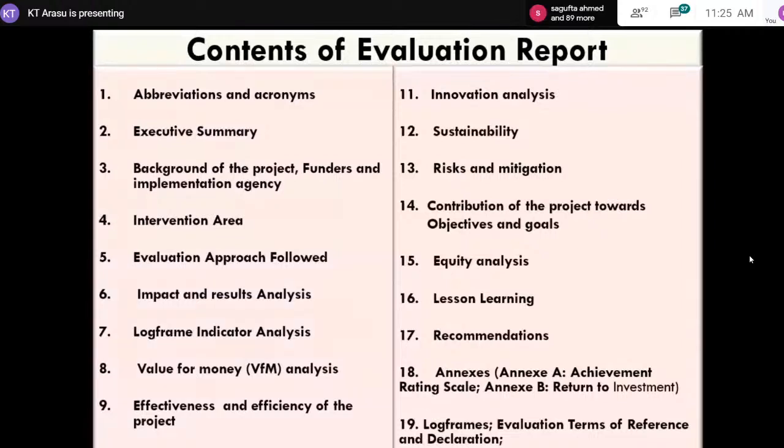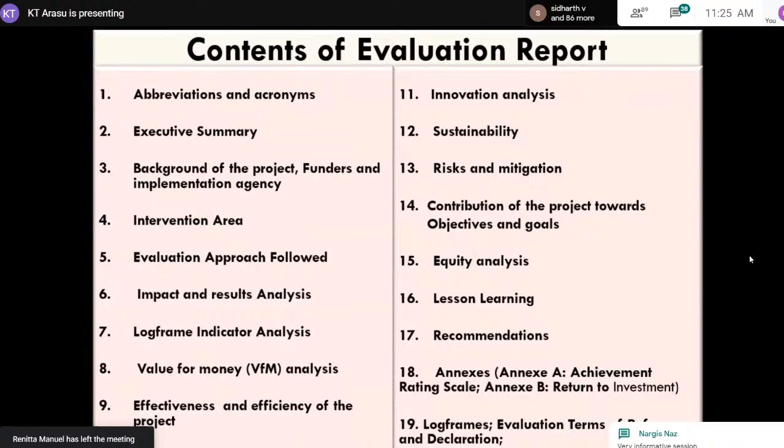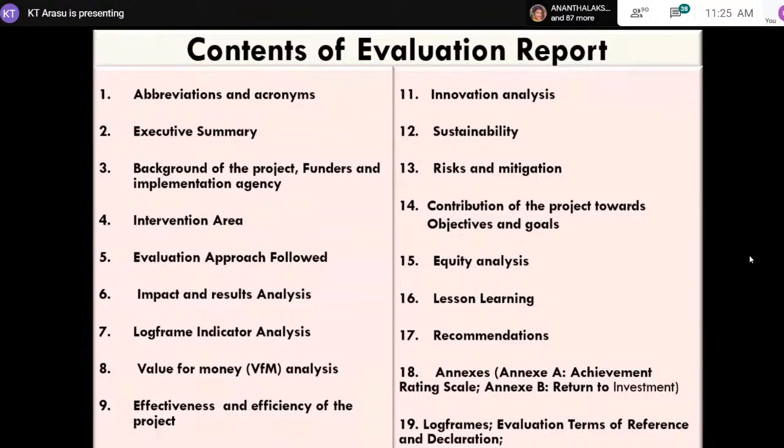For example, there are different reasons for donors to stop funding. Sometimes some agencies may have allegations that need to be proved, such as financial misappropriation, and that needs to be checked by external auditors. Investigation happens in the auditing. If there is evidence of siphoning or misuse of money in the evaluation, then the money will be stopped. Another part is that most donors sometimes keep back some part of the money. That is why they do a midterm evaluation. Suppose the project has a 4-year period and they conduct an evaluation at 2 years. Suppose at the end of 2 years, the project output and outcome have not been achieved, and it is below target.